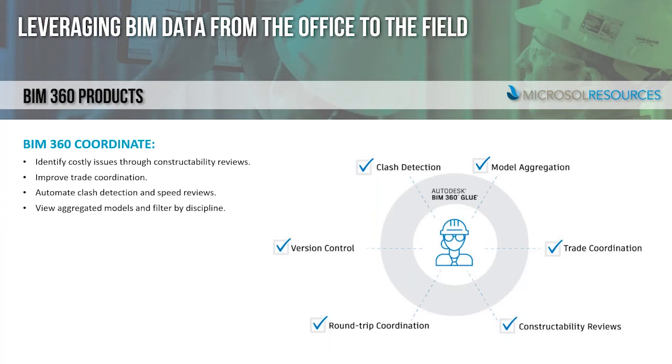And like other modules, issues and comments can be assigned to other team members so we can solve constructability issues earlier and faster. In many construction projects, clash detection only focuses on a certain number of high-level priority issues. What this means is that quite a number of smaller clashes can go unresolved prior to construction and won't be resolved until construction is taking place, thus causing quite a bit of rework, time, money, so on and so forth.